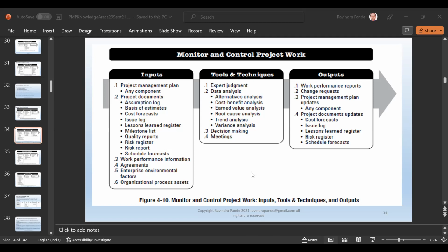And then we have the milestone list. Milestone list is basically a list of targets to be achieved with a given schedule. So let's say you're going to release such and such delivery on 1st of April, or vice versa. I'm just taking an example here. So on 1st of April you need to achieve this delivery. So before that you need to make sure you have these things developed, you have this thing tested, you have this thing packaged, built with something called a release note, and then release it to the client.